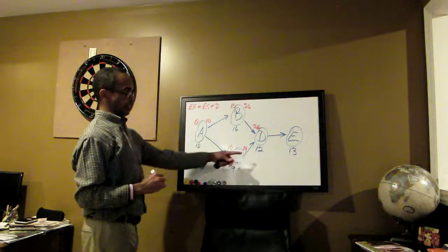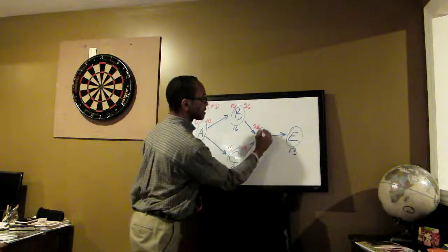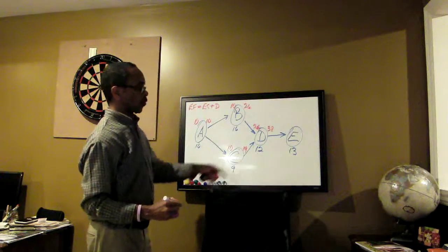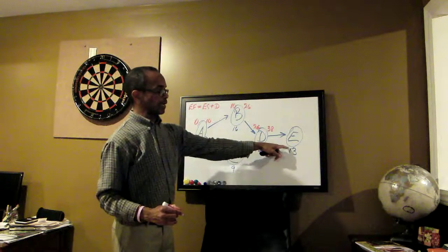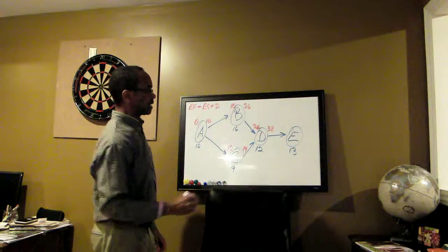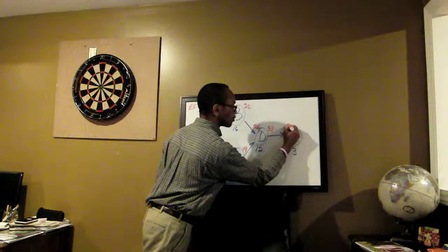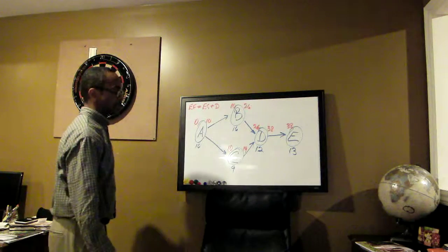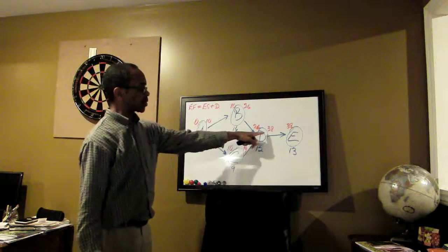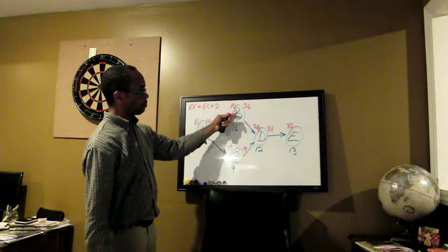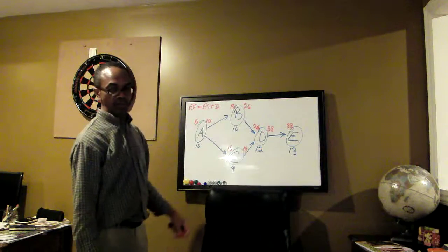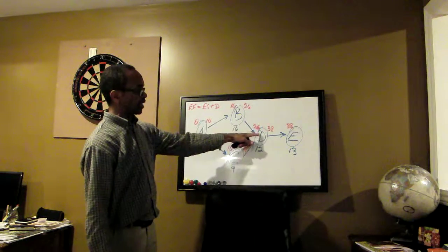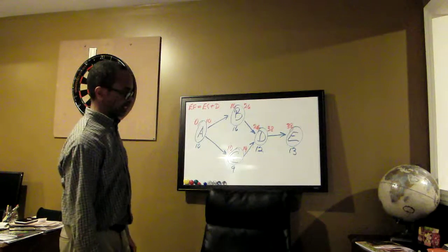And if we were to add our duration again, it becomes 38. And of course, E is the only successor to D, therefore we move the 38 over. E cannot start until D is completed. The same thing applied here. We could not start D till both B and C are completed. B finishes last, and therefore that's the early start for D.